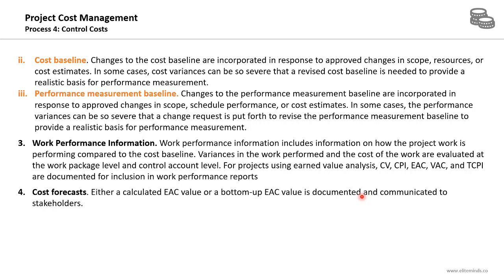The cost forecasts are outputs of this process, either a calculated estimate at completion value or a bottom-up estimate at completion value. It should be documented in the cost forecast that is part of the project documents and communicated to relevant stakeholders.